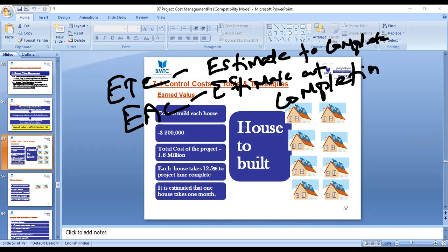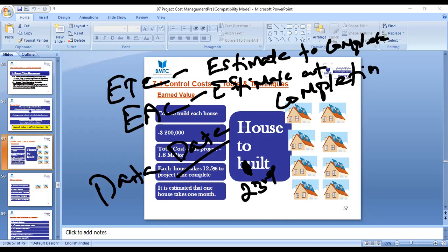Okay, now today you are measuring. So what is the date you're going to call this one? You're going to collect the data today. So the data up to date you're going to collect can be called the data date, right? The data date is nothing but the data which you collect on your project today for you to do the measurements. So this is called the data date. Now what happened here? You completed your work up to today. Today is what? 23 August. And your project will be completed in May 2024.